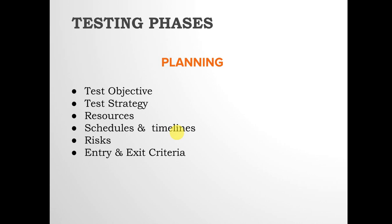Next is risks. The test manager or test lead assesses all risks associated with the testing phases — whether there are enough skills, software, hardware, budget, time, and resources. For example, if a resource leaves the organization, they need to assess whether there is a backup, and all such risks are evaluated in this phase.